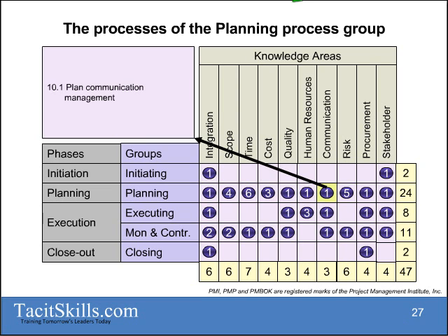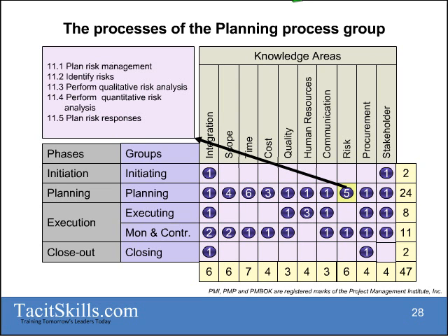As far as my risks are concerned, I also need a risk management plan. So who's going to be involved, all the definitions and all the process that I'm going to follow, the activities for identifying my risks, analyzing my risks, and then also to come up with a risk response.